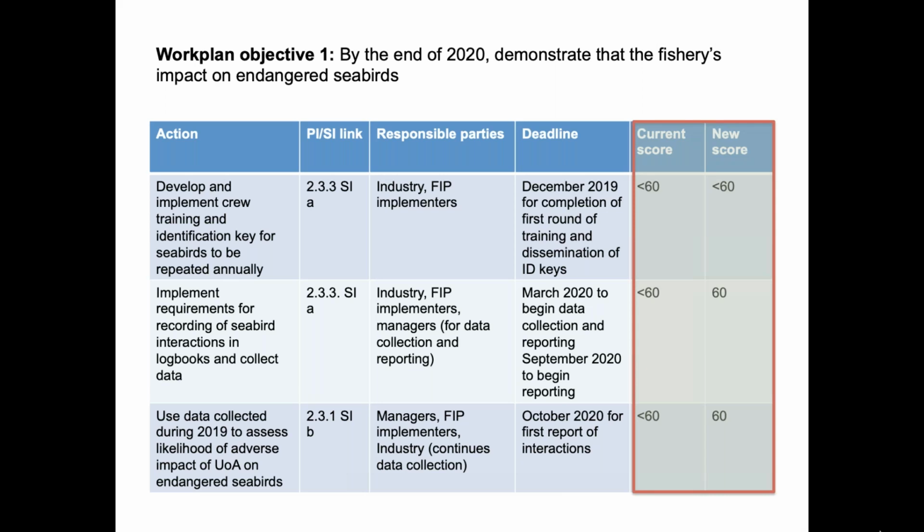But I think, to think about actions in a discrete way, as discrete steps within a process, it makes sense to divide them up this way. It would be a lot more difficult to report on action progress if, let's say, action 1 and 2 are all lumped into one thing, because I think it would just be too much. And it's a lot easier for everybody who is planning and doing this to chop it up a bit more. Kind of like Nicole was saying, the more granular, the better. So don't be afraid to write actions that might not improve a scoring issue score, as long as they're getting you in the right direction.